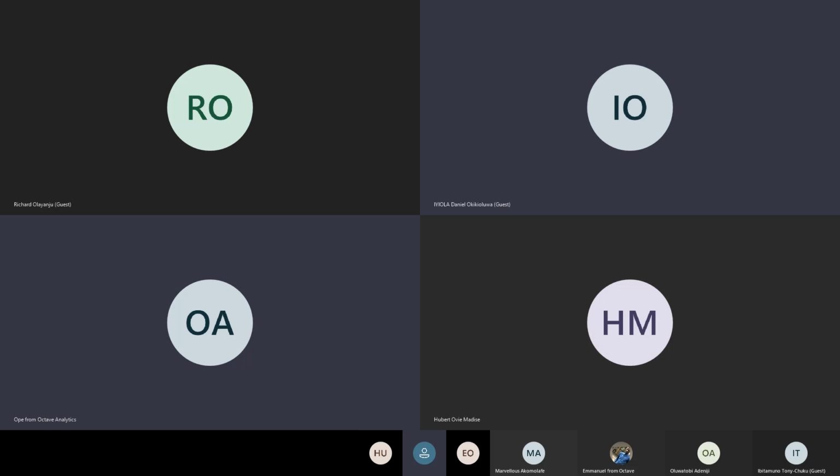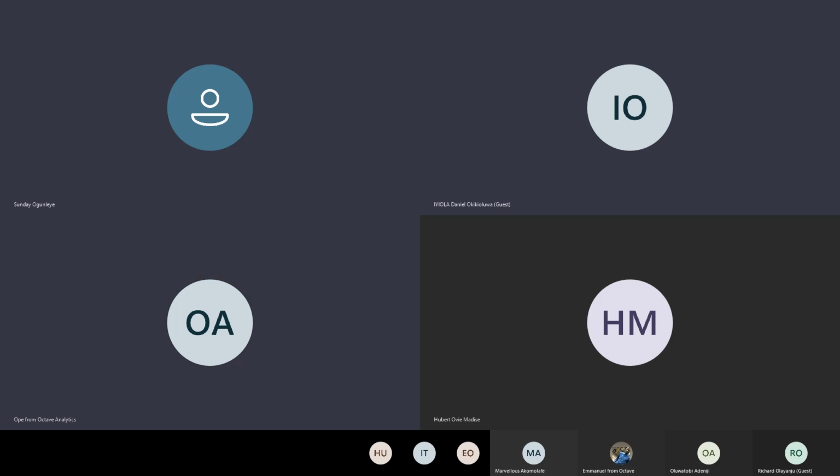Yeah, good morning. We talk about the RACI model, and we talk about the R, which is the responsible, A being the accountable, C is the consulted, and I is the informed. And we say that R, the responsible, can be the client, the person you are working for, or the team that will be taking over the project. If it's going to be a team, you have to name the people that are going to be on the team that will be responsible for the project.